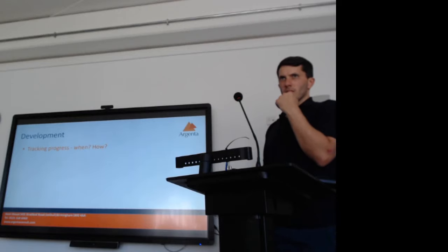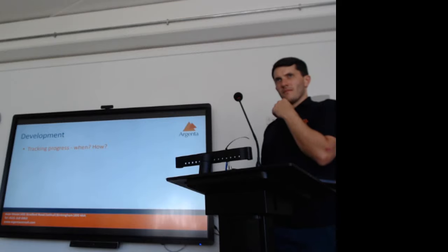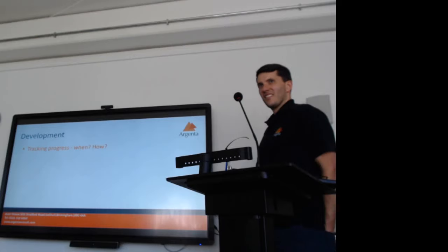But then there are 25 projects running and the same people doing a bit of each. And so there is a tool that's above Microsoft Project. I forget what it's called, but it's part of the Microsoft Suite. You can feed all those project schedules into that one tool and level them. So although you can level the resource through projects, it's still going to give you a very good overview when something's finishing in one project that frees somebody up further on. But it's very much into PM territory that I think you need to have a degree in project management to understand. Just about to start doing that.